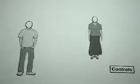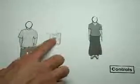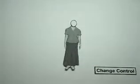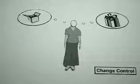My friend wants to be involved in the big decisions, but she's busy with the rest of her business. So we need to agree how I'm going to keep her informed and when I need to contact her urgently. No project ever runs without people changing their mind. Let's say my friend decides she wants a different kind of packaging halfway through the project. I'll need to check the impact that would have on the budget and the deadline.